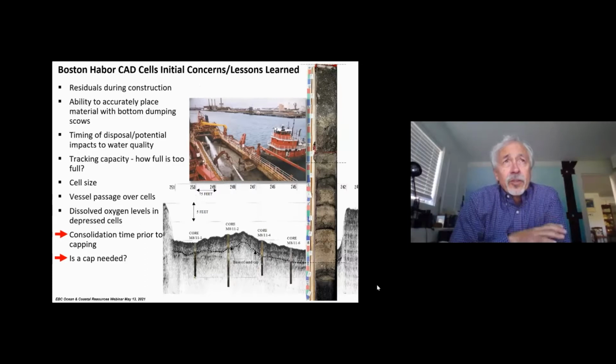Such that, one, you could discern the cap layer very easily physically, as well as the potential for creating a sort of new habitat type in the harbor, which was traditionally fine grained. What you can see in the upper photo here, Great Lakes, again, another innovation, dredged sand from the Cape Cod Canal, brought it up in their hopper, teed up a tugboat on the side of it and pushed it sideways. Really, that was an excellent approach for evenly spreading the sand across the cell.